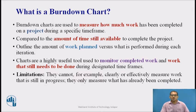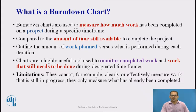However, as useful as they are, Burndown Charts have their limitations. They cannot, for example, clearly or effectively measure work that is still in progress. They only measure what has already been completed.